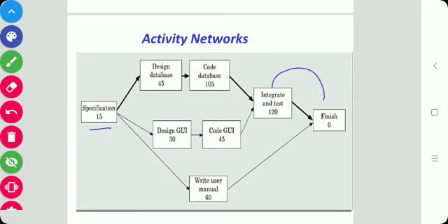Third, many managers believe that an aggressive schedule motivates the engineers to do a better and faster job, but a good way to achieve accuracy in the estimation of task duration without creating undue schedule pressure is to have people set their own schedules. So, all the people can set their own schedule, and according to that the activity network is performed.